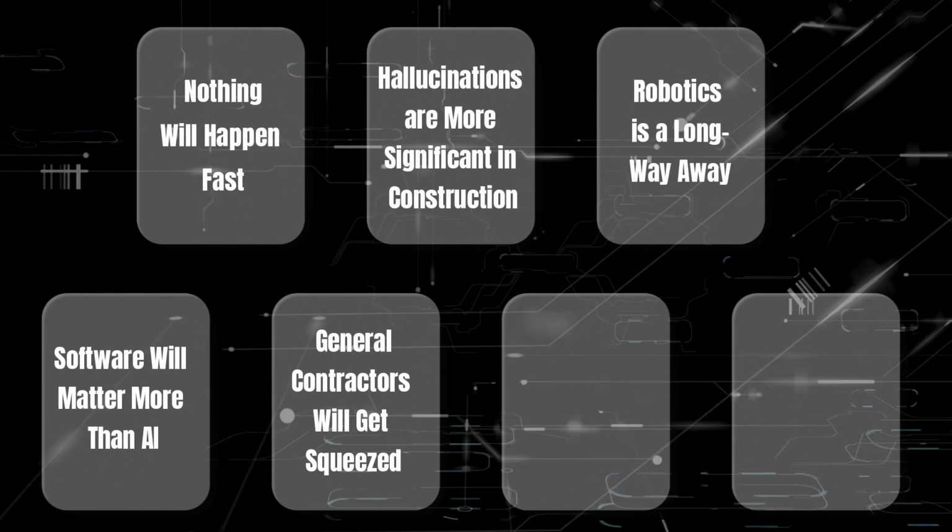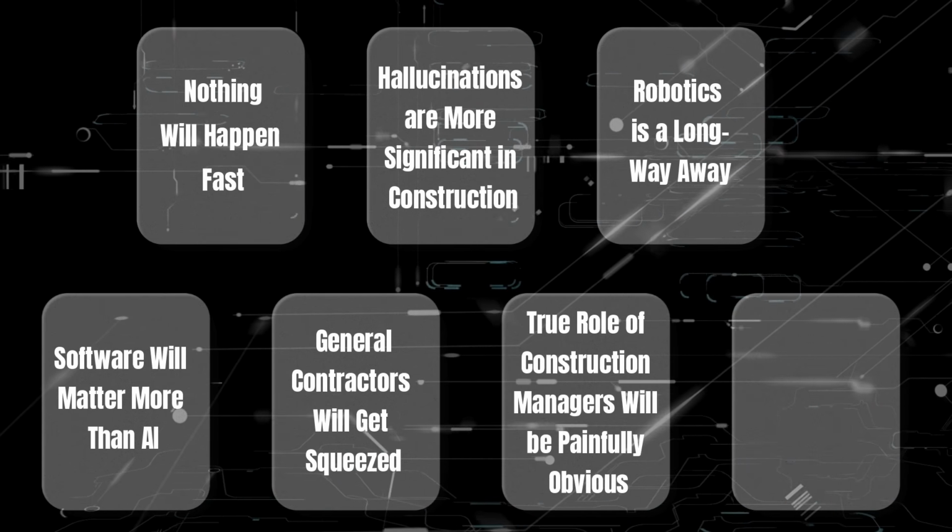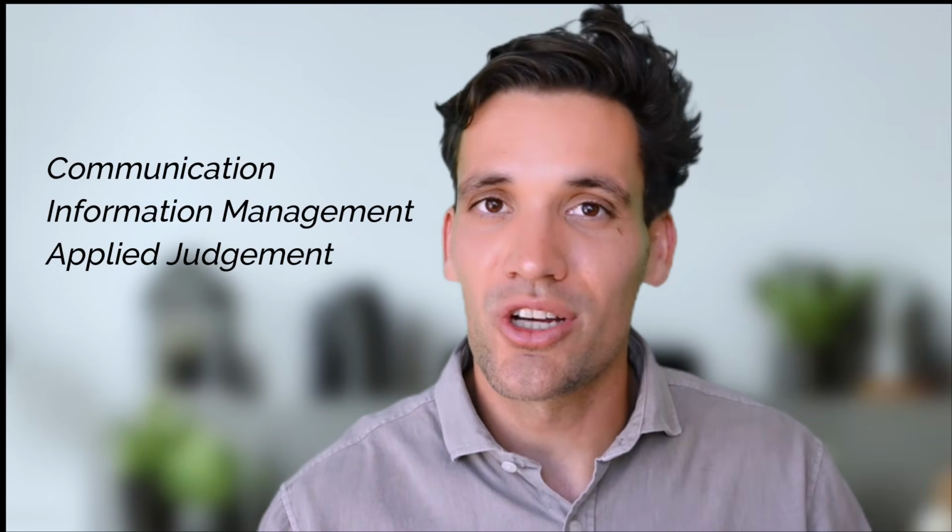Prediction number 6. The true role of construction managers is going to be painfully obvious. Construction managers and project engineers don't spend 10 hours a day at their desks writing ITPs, scopes of works, or preparing schedules. Most of our work is calling subcontractors, coordinating between different trades, passing information between people, checking things are done correctly, and making judgment calls. I see the job as about communication, information management, and applied judgment. You're basically getting paid to work out what's happening and make good decisions.